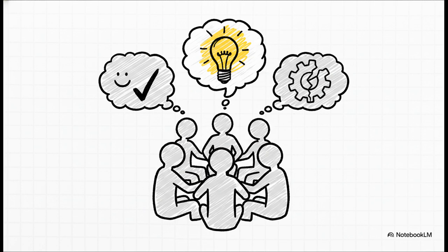They're asking, how did we work together? What went well? Hey, maybe the registration was finished early? Awesome. But what needs to improve? Maybe they realize that testing started way too late in the 2 weeks, which caused a huge bottleneck. And most importantly, they decide what to change right now. They agree, hey, let's involve testers on day 1 of the next sprint. This is exactly how a team continuously levels up their own communication and workflow.